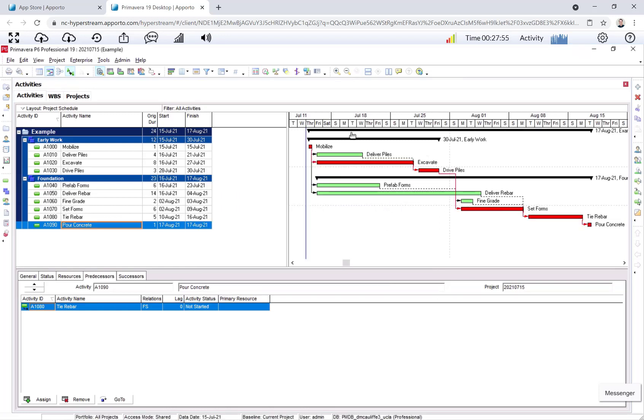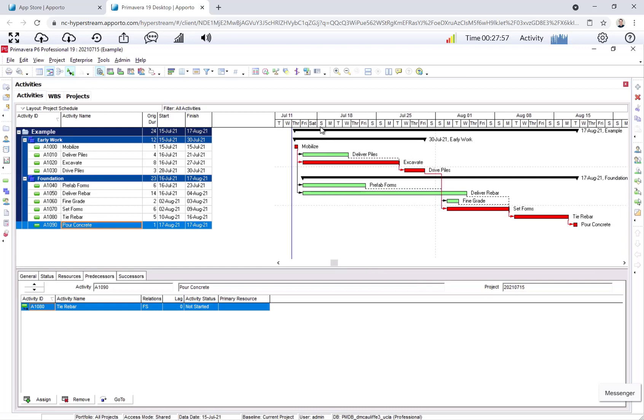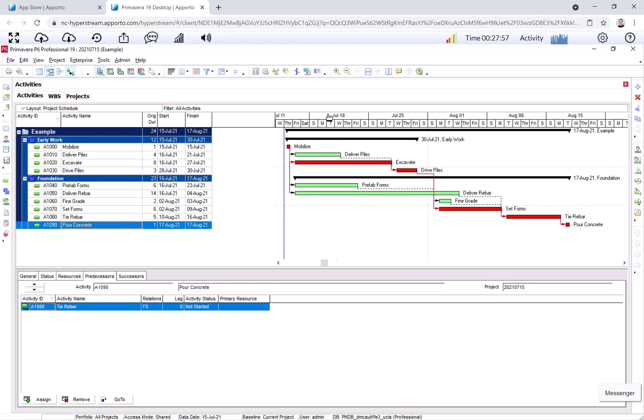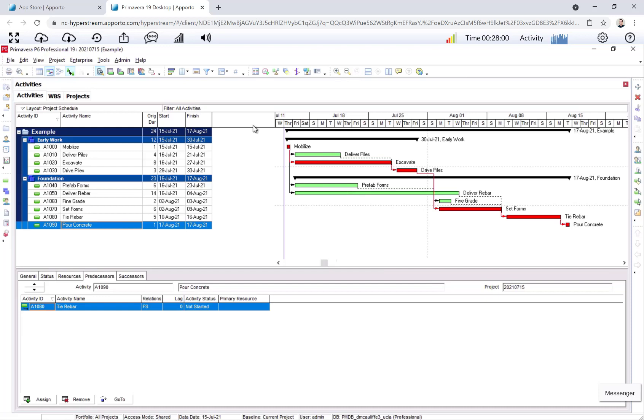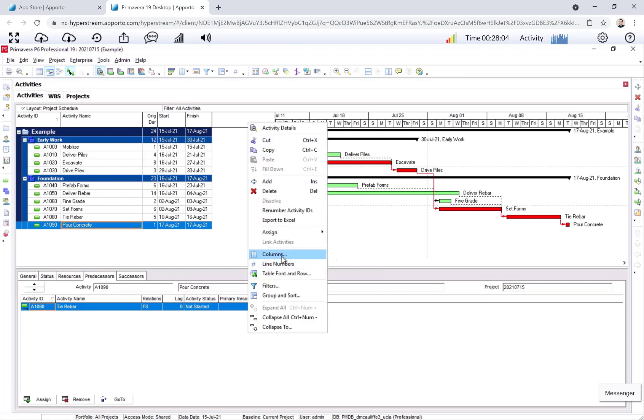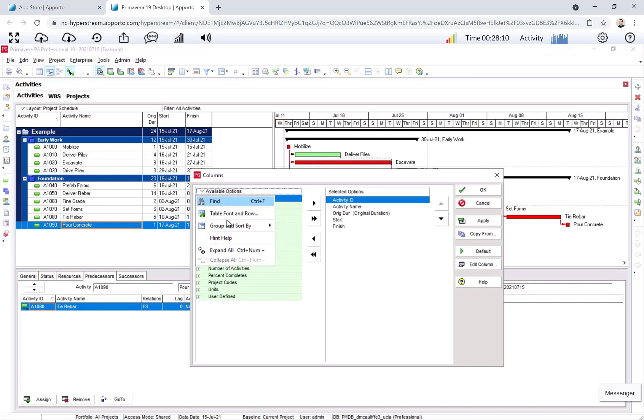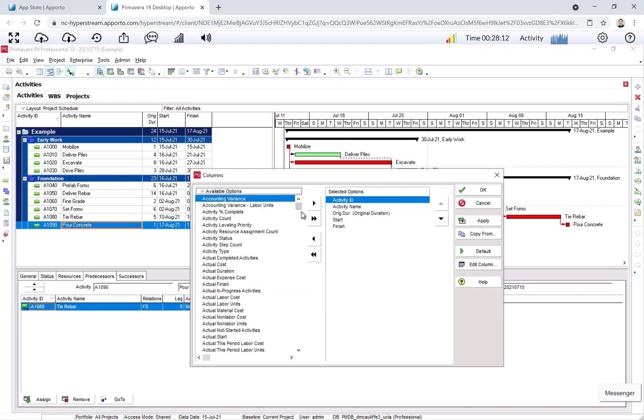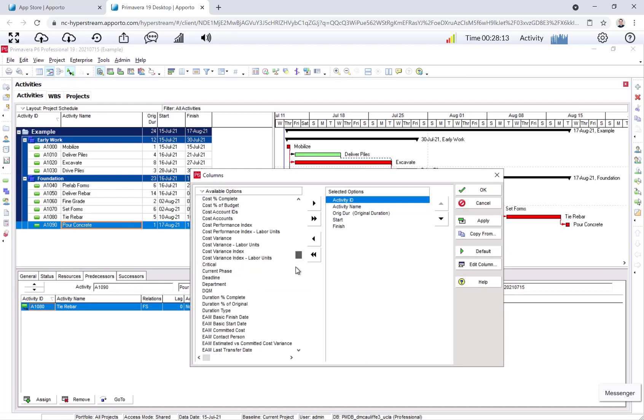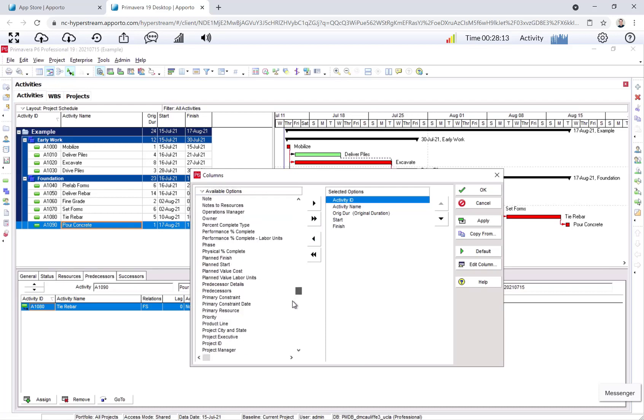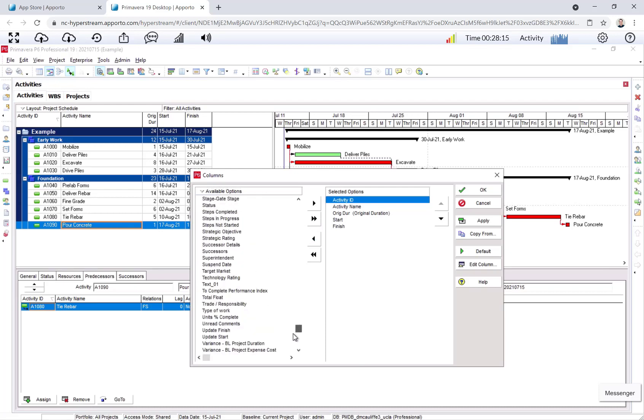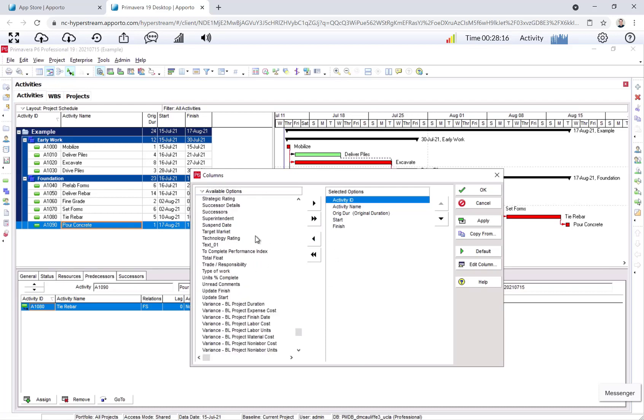And now I have a schedule. All the activities moved. I see start dates, finish dates, I see a critical path. I'm going to go ahead here in columns, and I'm going to adjust what information is being displayed. Instead of using these organizations, I like to just sort by a list alphabetically and add total float.